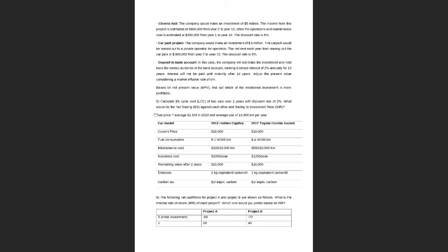And you have to discount that 1 million amount. It's the formula. Yes. This times 1.02 into 10. Yes, that's the formula. And then your answer by doing this should be equal to 1 million. And then you have to discount that 1 million amount into the present time by using the discount rate of 5%.